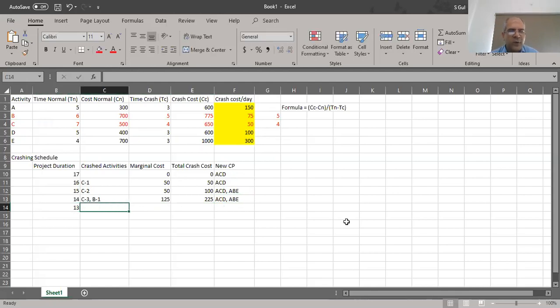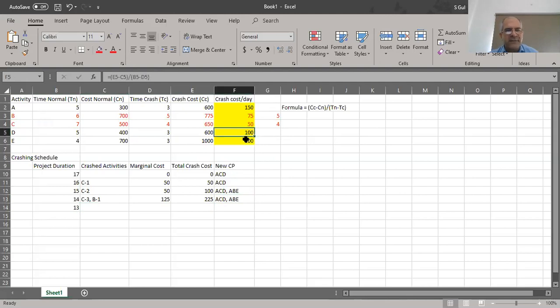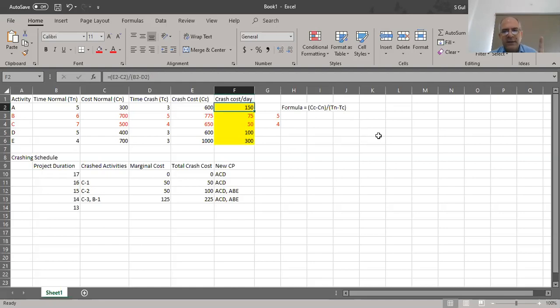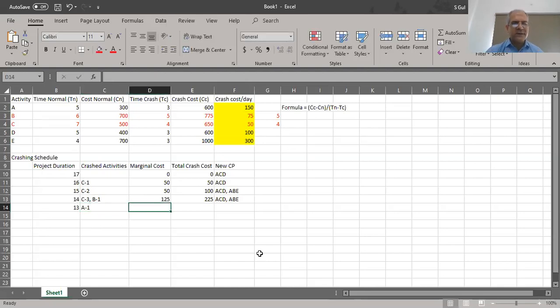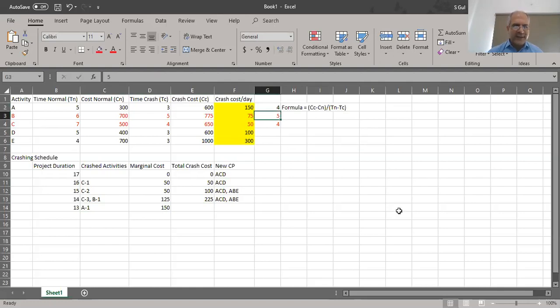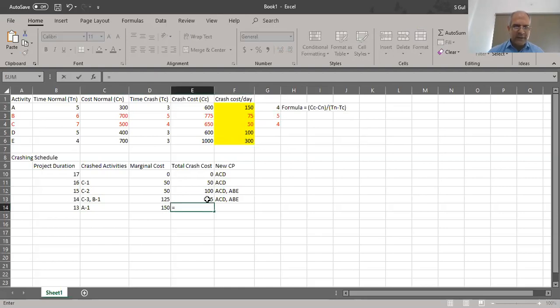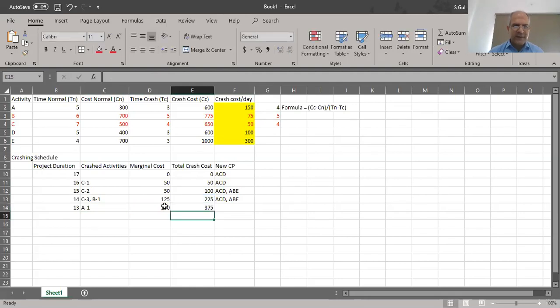To reduce from 13 to 12 days, the only remaining crashable activities besides D and E are considered. Crashing D and E together would cost $100+$300=$400, but crashing A alone costs $150. So we crash A for the first time, bringing it from five to four days, marginal cost $150, running total $375.